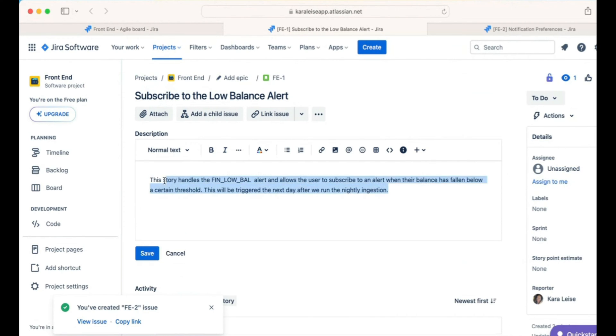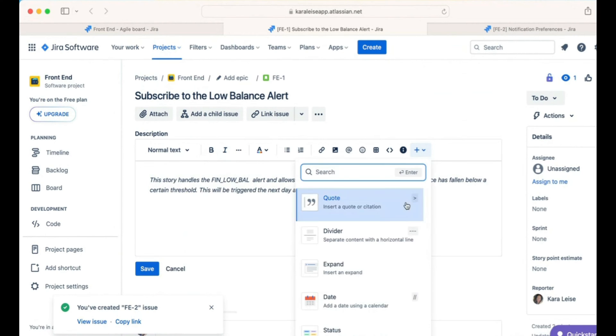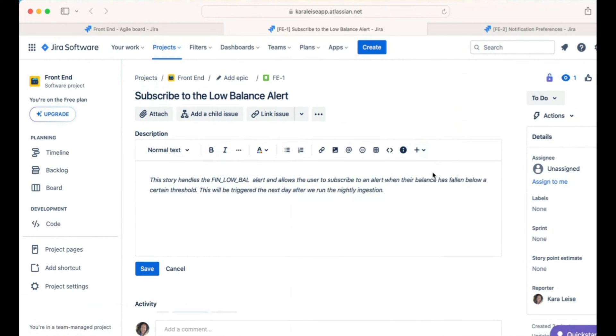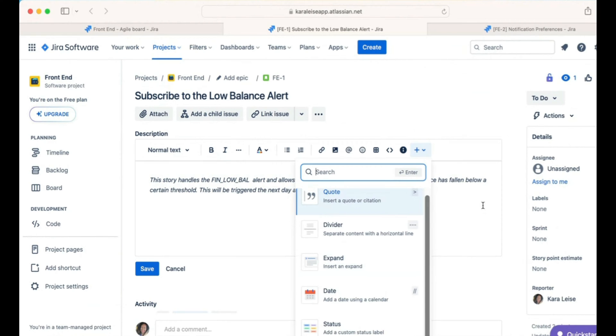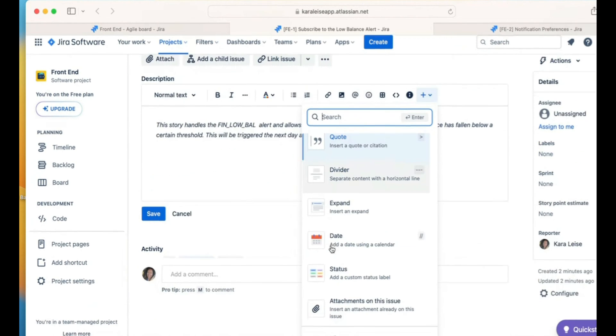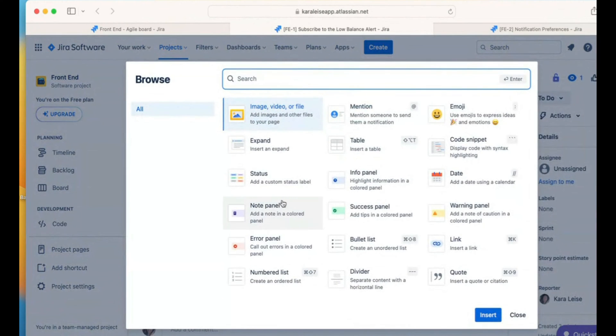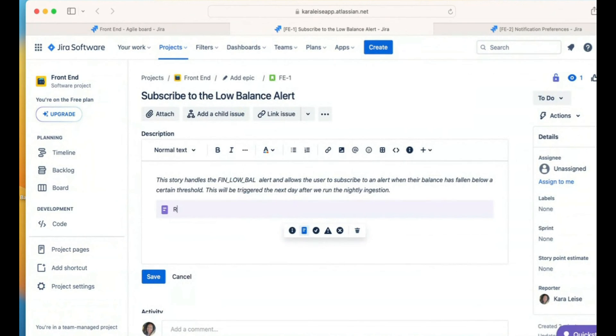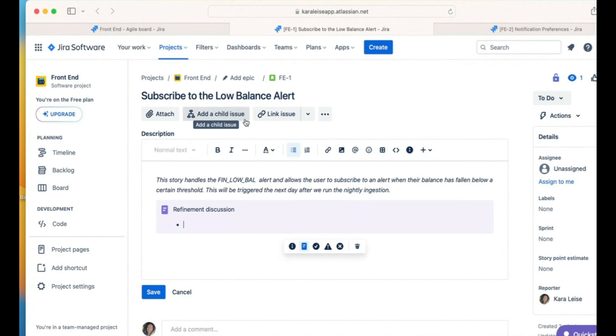When I do that, it helps whoever picks up the story to have a little better understanding before they jump into the acceptance criteria. Now because of experience, I know that even when I write the clearest, easiest to follow story, there's always something, somebody has some concern about something. There's always something that has to be discussed. So I normally just leave the same note panel, insert, and I call this my Refinement Discussion. This is the section where we will leave for any open items that will come up when we do our refinement of the story. For example, should we accept decimals in the amount field?